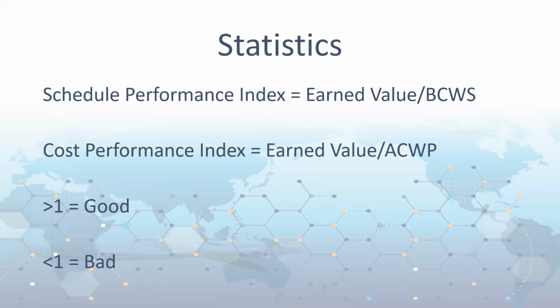And as I said, on a program where it has been used, the challenge there was they had to upload from a spreadsheet the resource profile. So they would break down the project into tasks in a spreadsheet, which was heartbreaking, but valid. That's what they needed to do to get the granularity they needed. And people's names against those tasks and hours and efforts, and profile that out, and then copy paste that as the person's profile in the resource planning. As you saw, I had people's profile in the resource planning screen.